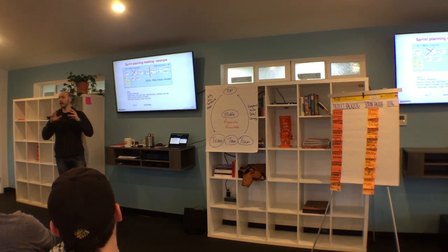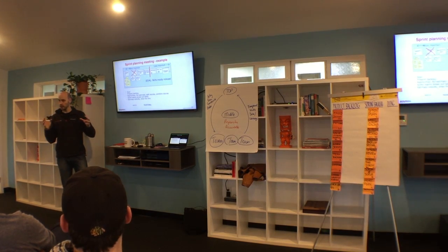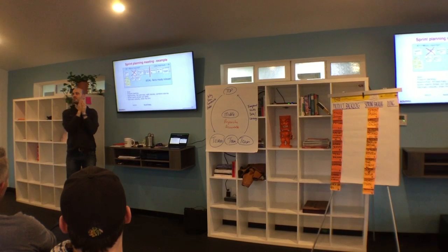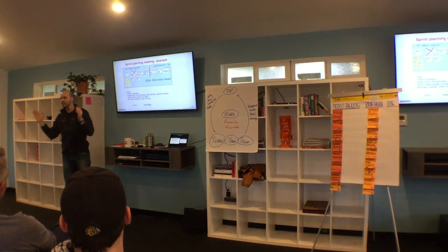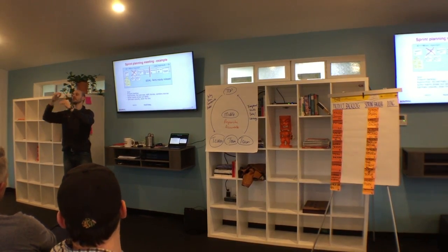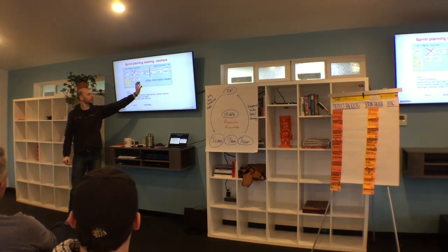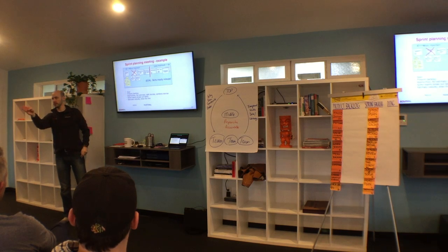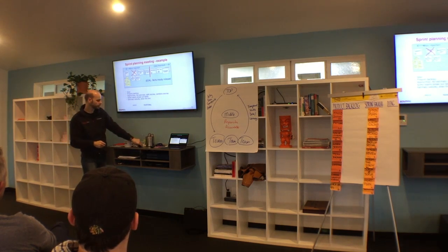This is where morale as a multiplier of velocity comes from. Having an achievable sprint goal is based on yesterday's weather, not because the team thinks if everything's perfect, we'll achieve it. No, based on our historic trend, we are likely to achieve it. Velocity and morale build on top of each other. So we would choose a piece of this that does fit in yesterday's weather, exactly to your point. Great, thank you.